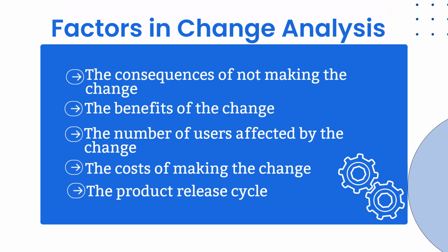Factors in change analysis. Number one, the consequences of not making the change. This element evaluates the risk or adverse effect of not putting the suggested change into practice. It considers the ramifications of keeping the status quo as well as any mischances or difficulties that might result from not making the change.